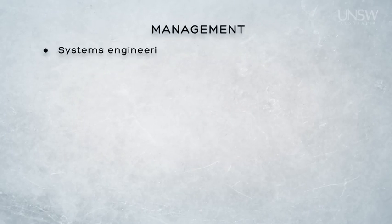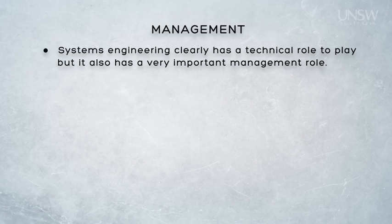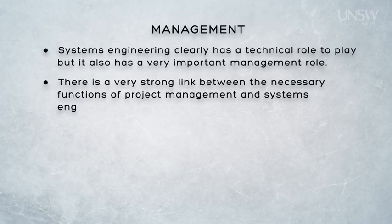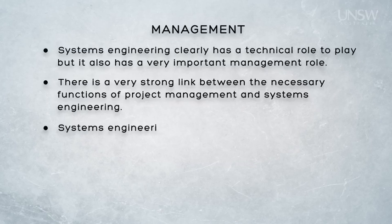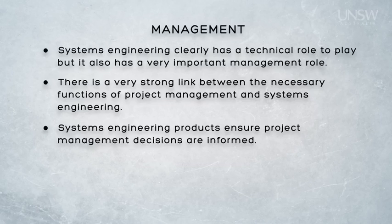Finally, management. Systems engineering clearly has a very important technical role and provides the essential methodologies for system development, but it's not just limited to technical issues and it's not simply another process to be adopted. Systems engineering has both a management and a technical role. Project management is responsible for ensuring the system is delivered on time and within budget meeting the customer's expectations, and the trade-offs and compromises implicit in those functions are informed by systems engineering. Additionally, the scope of the project is defined by the work breakdown structure, which is predominantly the result of systems engineering and requirements engineering — so systems engineering, requirements engineering, and project management are inextricably linked.